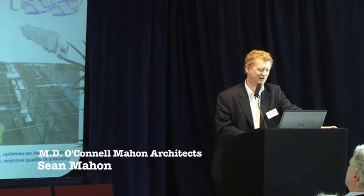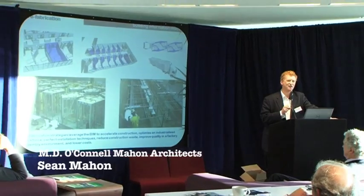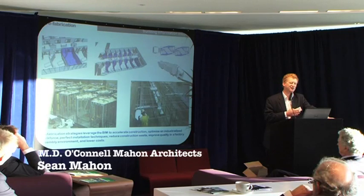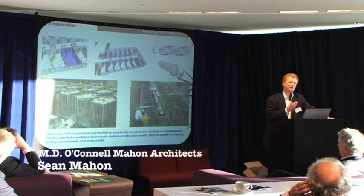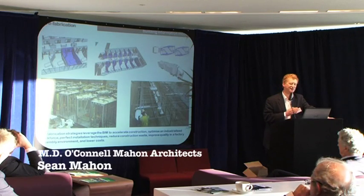One is the whole issue of prefabrication, which can be much more supported through building information modelling. Prefabrication can lend itself very, very well to large-scale healthcare developments, where there is, for instance, a repetition of single rooms in new buildings, and the preciseness that's required in terms of the delivery of internal elements and internal partitions that are both coordinated and designed into singular elements and delivered to site on a prefabricated basis.